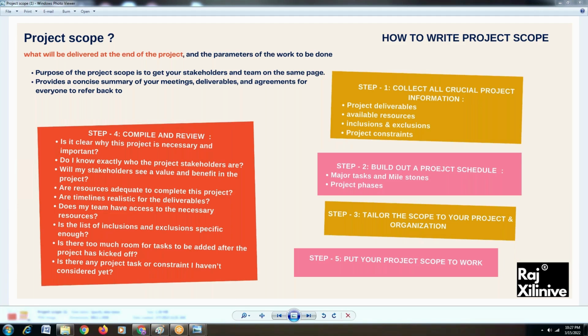At the same time, do we have access to the resources? For example, whenever we are working on government projects, there will be restrictions on data access, because they have their own security controls, which don't allow us to use the resources. They are not allowing you to take the data because the data is sensitive. These are practical difficulties, because without data you cannot work on testing and so on. These practical difficulties happen whenever we are developing a project.